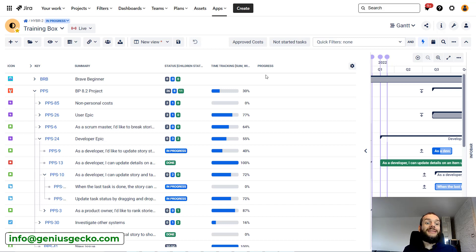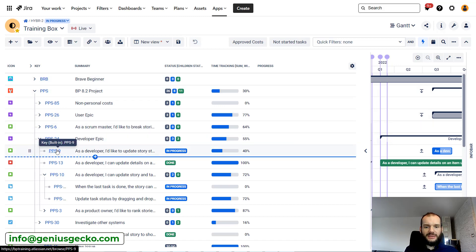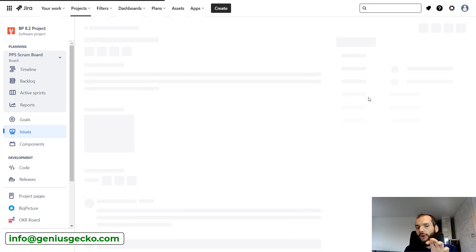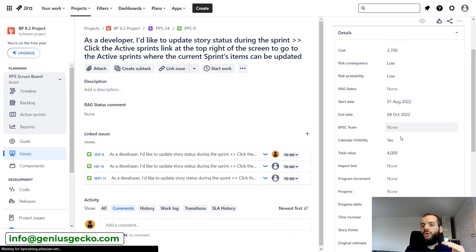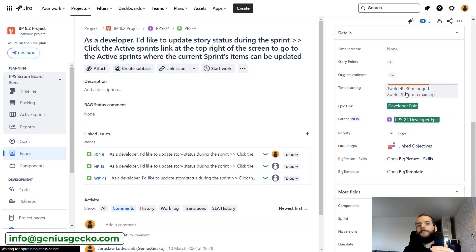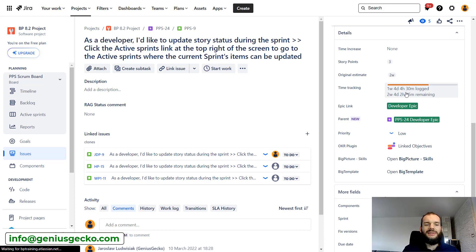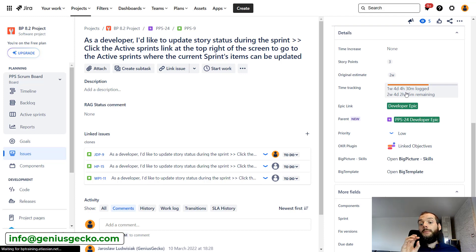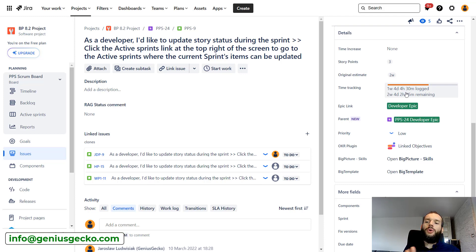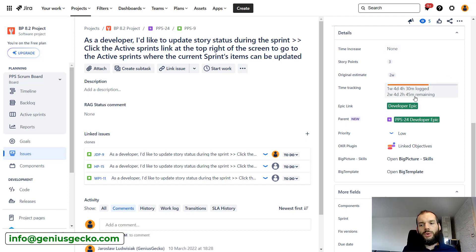The second way to track progress is by using time tracking. As most of you know, Jira has a feature where you can estimate tasks with an original estimate, then log time. Jira tracks what the estimate was, how much time was logged, and how much time should remain. Of course you can increase the remaining time if the original estimate wasn't precise. For example, in this case you can see that we logged one week, four days, and some hours of work, with two weeks of work still remaining.